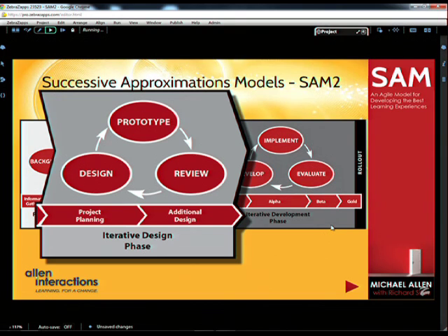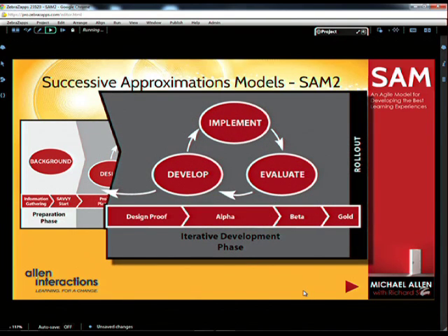And then finally, in product development, the iteration, we do the same thing we do in other places, the Agile process. We do a small piece. We try to keep the work to not more than 2 weeks, but sometimes it's as much as a month. And you deliver something that people can actually use and test, always. It's not a specification for something to be built. It is something that's usable. It's probably crippled in a lot of ways, isn't complete. You know, it may have some placeholders in here.